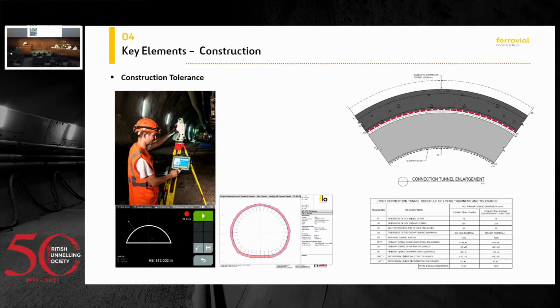So this is kind of a profile. Let's say, for example, if you need to excavate, you cannot see properly, but when excavating, you have a tolerance of plus 150 minus zero, so you cannot excavate less, but you can over-excavate. But using these kinds of tools gives you the possibility of getting tied to what you need, because if you get 150 over-excavation, you're going to get 300 mil over-excavated. That would be more muck away, more time with the face open, more shotcrete needed, and it's quite a useful tool.